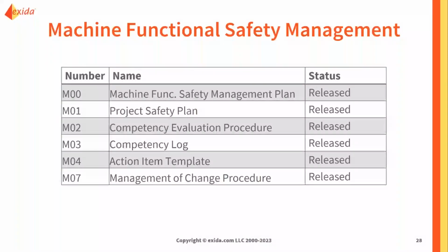We've got a project specific safety plan, ways for documenting the RACI charter in there, the competency evaluation procedure and log, tracking action items consistently, and also management of change again, which is a really critical one for making sure that we are managing changes to the safety critical system.